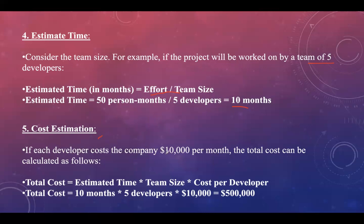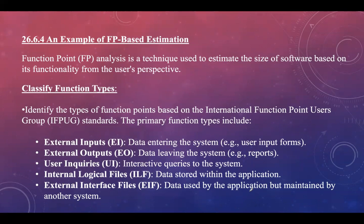Step five is cost estimation. If each developer costs the company $10,000 per month, the total cost is calculated by multiplying estimated time by team size by cost per developer. Estimated time is 10 months, team size is 5, and cost per developer is $10,000, giving a total cost of $500,000.